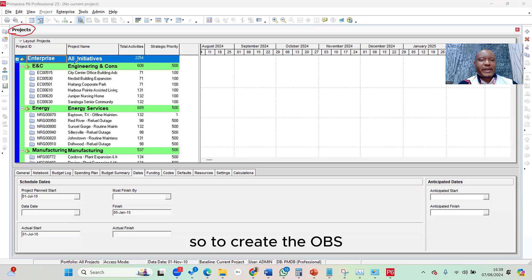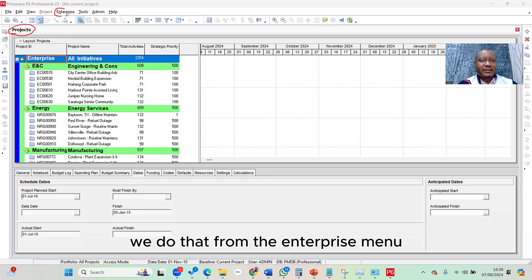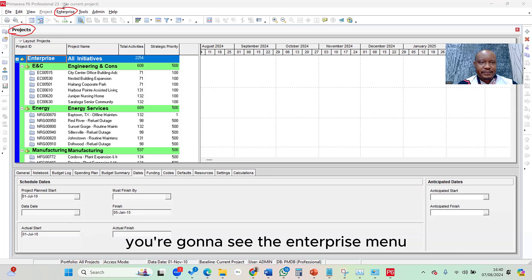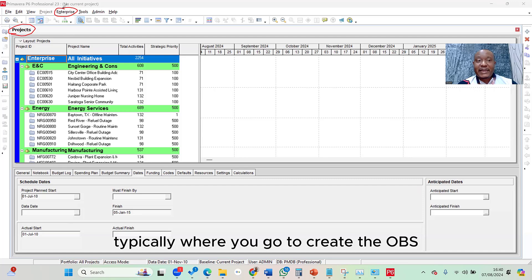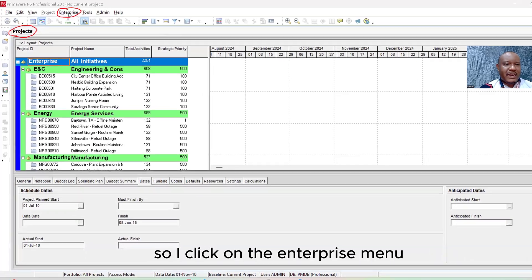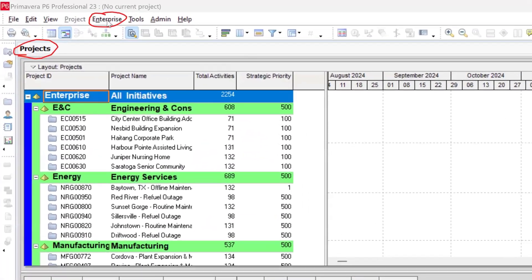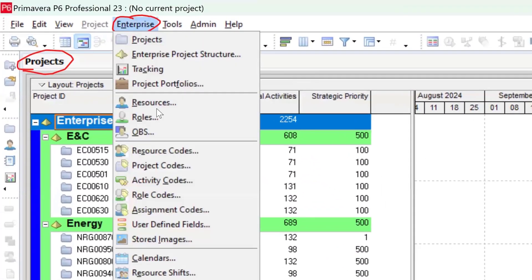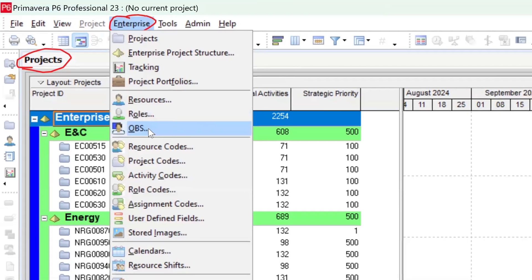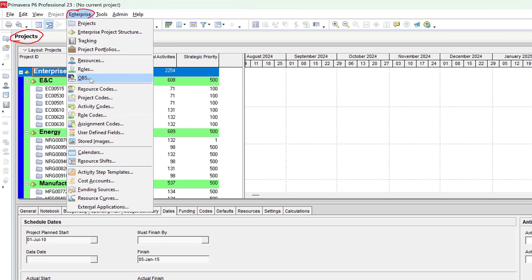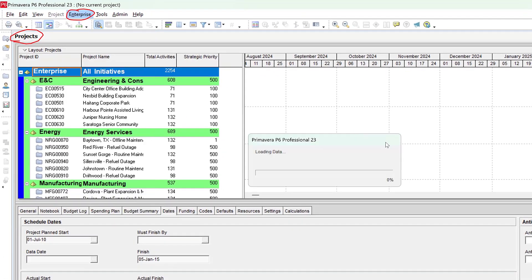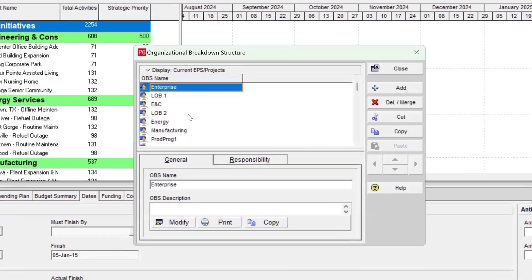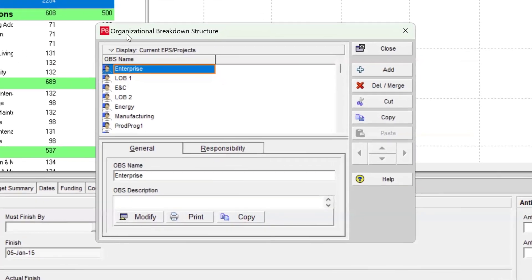So to create the OBS, we do that from the enterprise menu. If you take a look at one of the menus we have here, you're going to see the enterprise menu. The enterprise menu is typically where you go to create the OBS, and that's exactly what we're going to do right now. So I click on the enterprise menu, then it drops down, and then you would see OBS here. So I click on OBS. Once I click on OBS, notice the OBS window pops up. So this is the organizational breakdown structure.